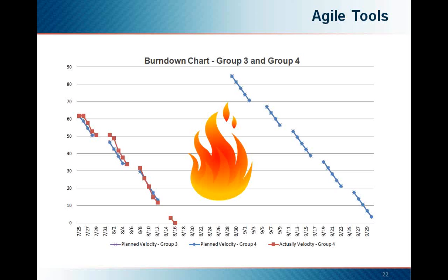After the tasks are estimated, the amount of effort that the team can produce every day is indicated in the slope of the planned line. This is often referred to as the team velocity. This chart is updated daily and progress reviewed. Issues preventing a task from completing on time become immediately evident and can be managed appropriately.